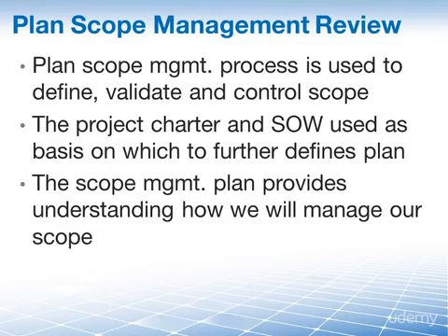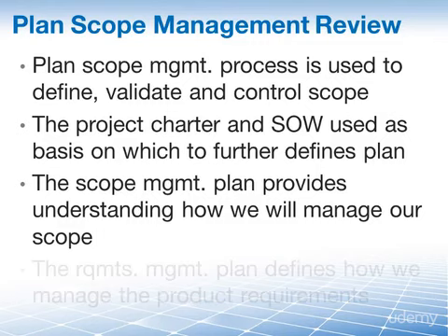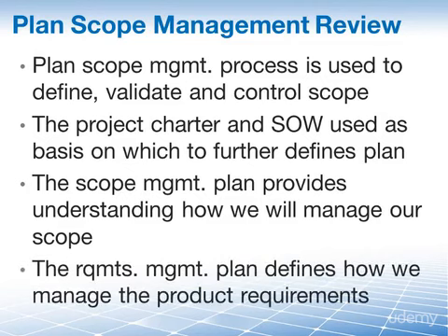And finally, we looked at the components of the requirements management plan, which determines how we will plan, track, and report on requirements activities, manage the product configuration, use metrics to make sure that the product meets the requirements, and establish the attributes used in the requirements traceability matrix.